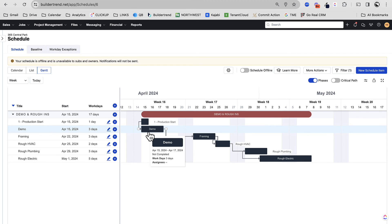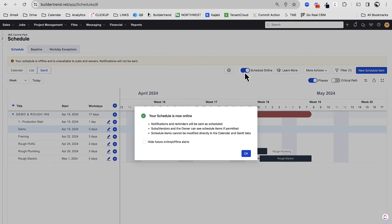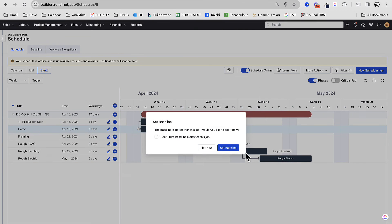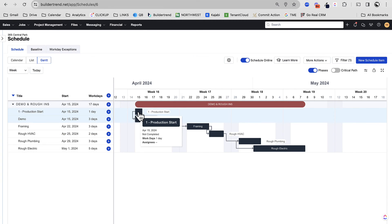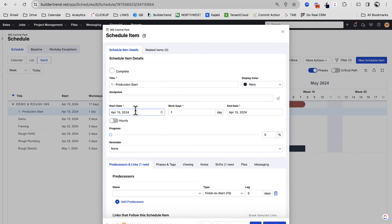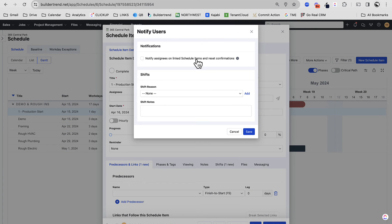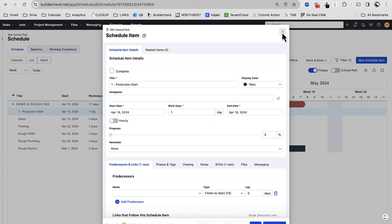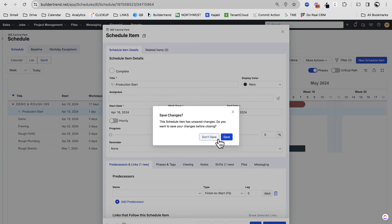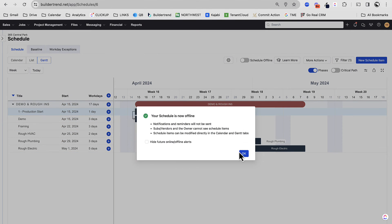So we're starting to build out our schedule and things are starting to look pretty good. Now, just a few other items on how we can view the schedule and some admin on this. Schedule is online or offline. Right now I'm in offline mode and I encourage you that whenever you're building a schedule or doing mass edits to a schedule, stay in offline mode. The reason is that if I'm on online mode, whenever I move an item, I can't click and drag it for one. And then if I were to move an item, it's going to ask if I want to notify people or if I want to record shifts. So if we're doing a lot of stuff, it's going to ask us that way too much.